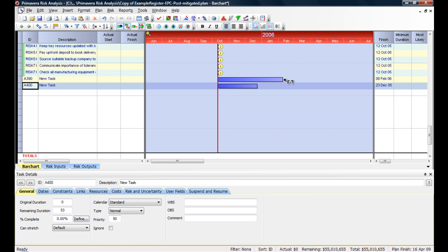Now if I go slightly further to the outside of an activity, I'll see an F dash and then a question mark. On the front end, I'll see an S dash question mark. That's to create links. So I can go in and create a link directly in the Gantt chart. So I can hold and drag, and when it says F to S, I let go of the link and I'll snap that out. It'll create the links for me automatically. So there's a lot you can do directly on the Gantt chart that really helps speed things up for you.